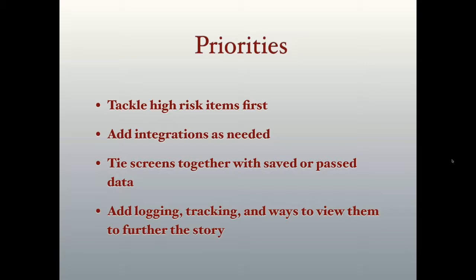Get the high-risk items front-loaded, because those are the things that are most likely to blow up a project, either taking a lot more time than you expected, or you may have to go back to a vendor and spend a lot of time waiting for them to respond, stuff like that. So get the high-risk items front-loaded into your demos and your story and how you go through stuff.